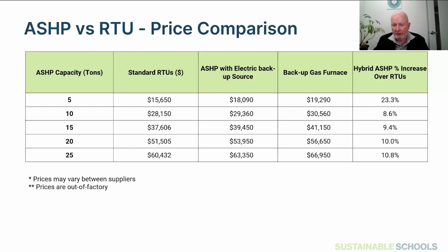And in case I haven't been clear, we are recommending hybrid gas unit for as long as gas is available and affordable. So we believe that hybrid and the continuing use of gas is necessary to make this whole transition affordable. But looking for, in terms of equipment cost premiums around 10%, and total project cost premiums, because installation is similar, the curbs are similar, the electrical connection is similar,